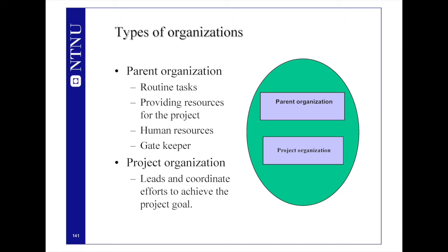And the parent organization is also a gatekeeper in the sense that it is actually up to the parent organization to start a project or to bid for a contract. It is not the project organization who does that. The project organization has one task: to lead and coordinate resources to achieve the project goal or the project mission.